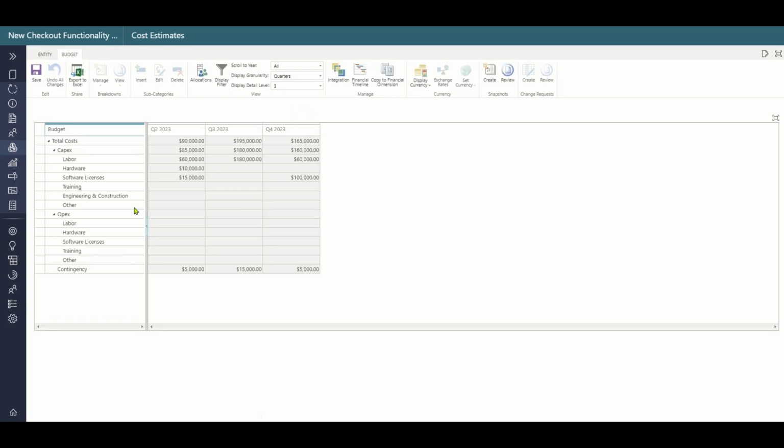The cost coding structure is defined with you as part of the configuration for your implementation. The cost codes can be different for each entity type you need. For example, your IT projects may have labor, hardware, and software, where your construction projects may have concrete, steel, and landscaping. The cost codes help a project or program track what work is being done based on costs.